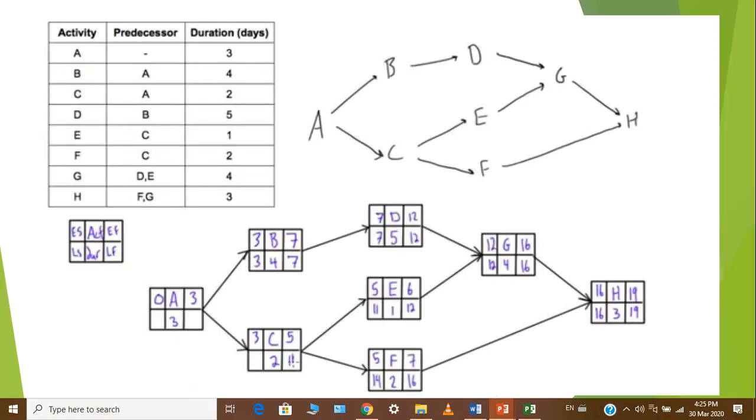I'm just going to throw this up here to recap what we're trying to do. We had our work breakdown structure that defined all the work packages. We had our milestones, and we worked them down into deliverables, then further into sub deliverables, and right down to the lowest tier, which is our work packages. And we want to stop at the work package to be safe.